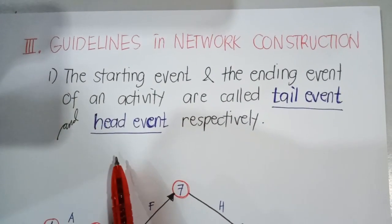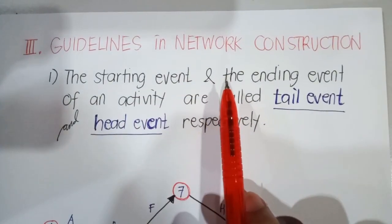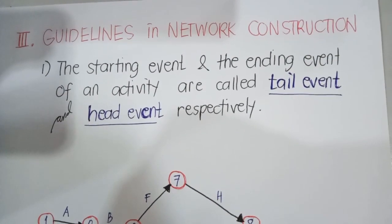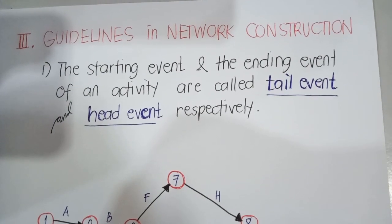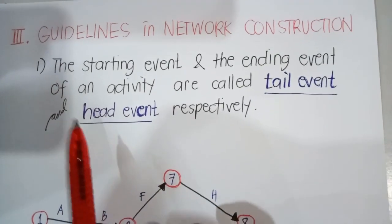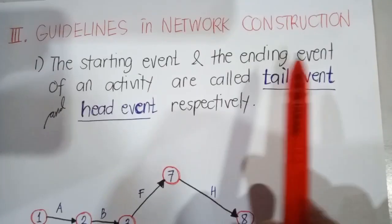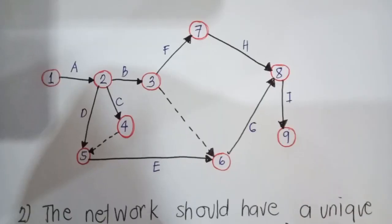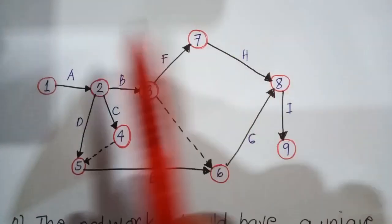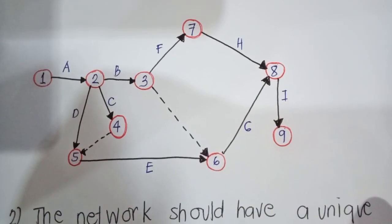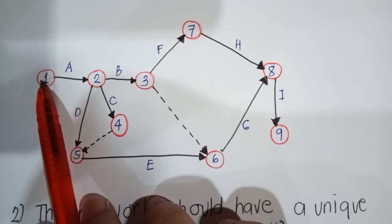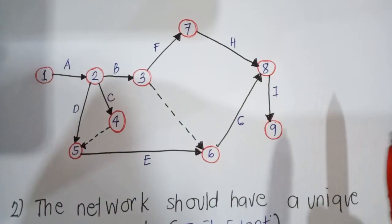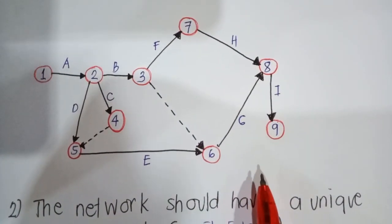The next basic concept is the guidelines in network construction. There are six guidelines. Guideline number one states that the starting event and the ending event of an activity are called the tail event and head event, respectively. In a network diagram, the numbered circles are called nodes — we have nodes 1 through 9 and activities A through I. Node 1 is our starting event and is called the tail event, while node 2 is our ending event and is called the head event.